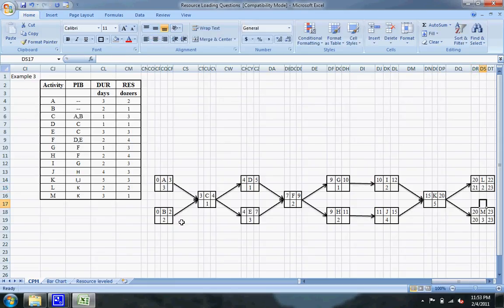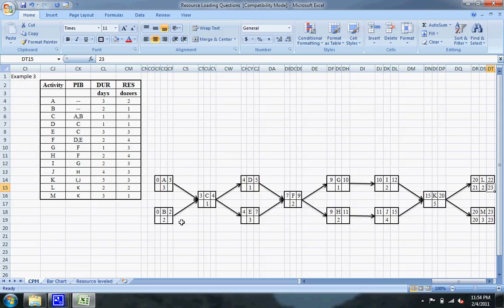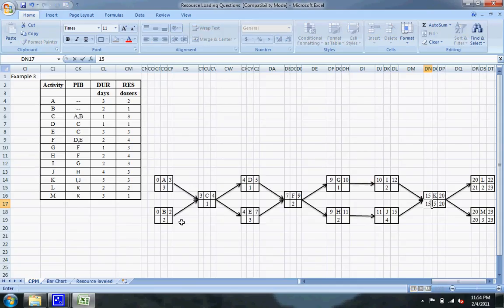Now we'll do the backwards pass. The late finish of L is twenty-three because the last two activities are L and M. Since M finishes on the earliest on the twenty-third, L can also finish on the twenty-third without delaying the project. That means we're going to have one day of float on activity L. The latest that K can finish without delaying the project is the twentieth — if it starts after the twentieth, it's going to delay activity M, which is on the critical path and will slow down our project.